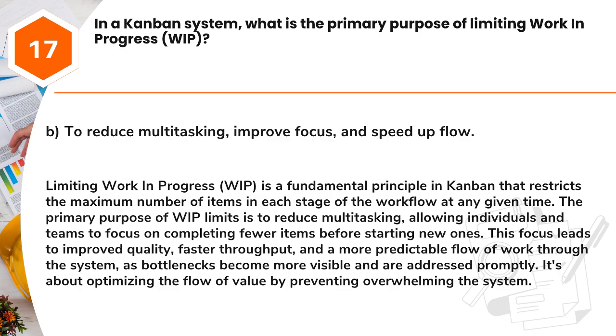Answer: B. To reduce multitasking, improve focus, and speed up flow. Limiting work in progress, WIP, is a fundamental principle in Kanban that restricts the maximum number of items in each stage of the workflow at any given time.